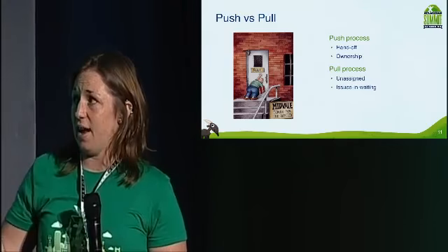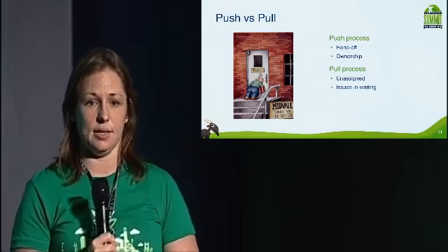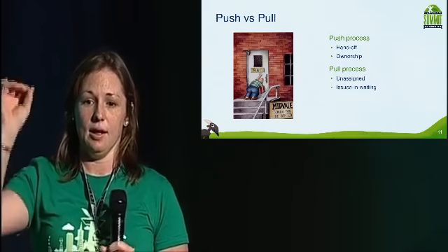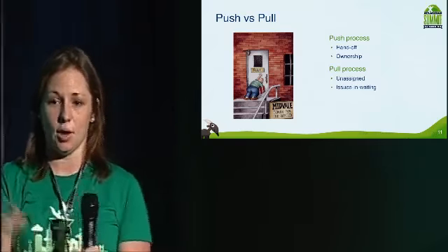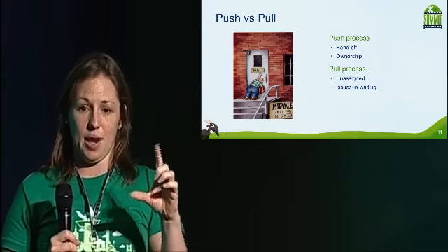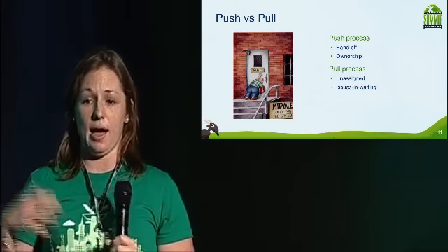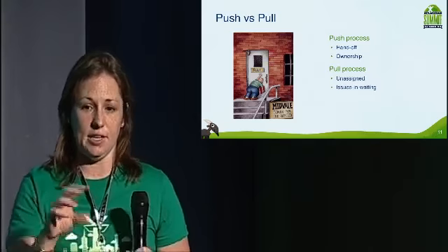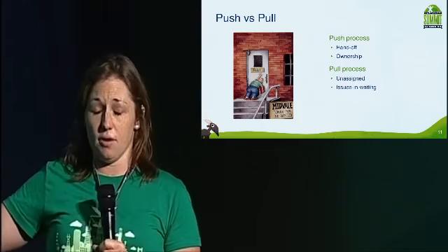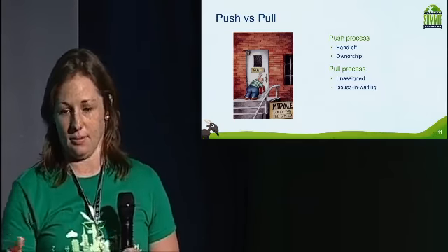The opposite of that is this pull process. So a good example, if you've ever used our support system, support.atlassian.com, you can create a support ticket for any of our products, and as soon as you hit create, that says unassigned. Those go into this holding area, and our support engineers can see on all of their JIRA dashboards what's coming up next, what they can go in, they can pull out individual tickets and work on them themselves. Or if you have a manager who wants to go in, take 15 items and triage them out to people, that's also this pull process. So JIRA workflows can be built for either of these, but you want to know which one you're building before you start building it.